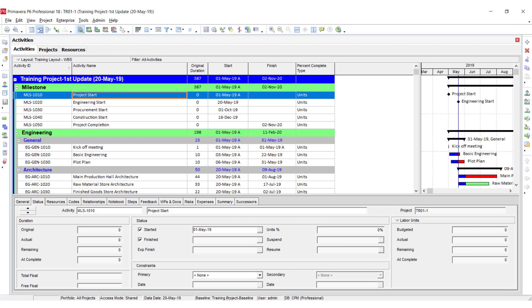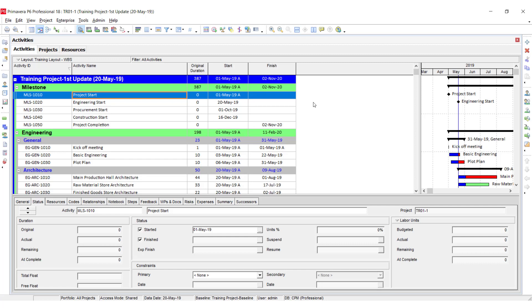You can see from the bottom in the status bar that the baseline is 'Training Project Baseline.' When the baseline is not attached, it will be written as 'Current Project.' Now the baseline is attached and we want to show it in the activity table and in the Gantt chart.